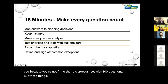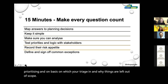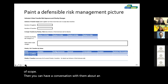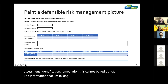These things feed into awareness. And when stakeholders understand why you're prioritizing, on the basis on which you're triaging, and why things are left out of scope, you can have a conversation with them about an overall view of where you are. This may be a front sheet for a status update, where you're demonstrating that you have this amount of transfers with this exposure at this stage in their assessment, identification, and remediation — all fed out of the information I'm talking about gathering.